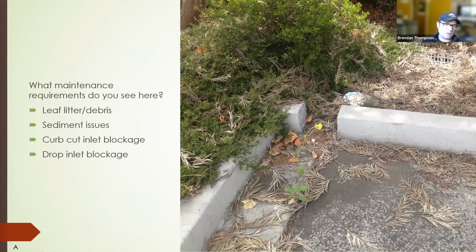And currently through our 401 certification process, when a project comes in and they're proposing a permeable gutter pan, we've been pushing those projects back to the applicant and saying, find another way to get your water into your bioretention unit, because this is inevitably going to fail. And we don't want to have to deal with making you rip up your road and retrofitting your curb to get water into your bioretention unit another way.